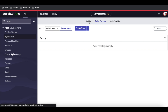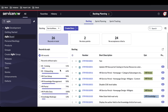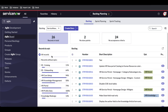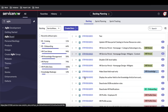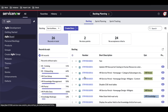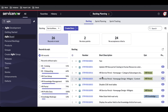Right now the backlog is showing all epics and stories. We can narrow this down — filter by epic or theme. Currently in this backlog I can see all records. Now I want to restrict it to show only stories related to a specific epic, like the Service Catalog-related epics.